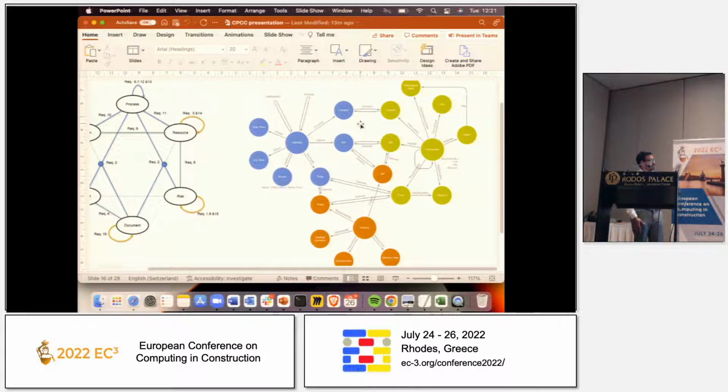three main things. One is activities. We need all the activity information, and that activity should have a document's information. So if an activity has to happen now, a document had to be submitted one month ago to go through all the checks and so on. We had rules written over it, and each document would have a work package. It would be at a zone.